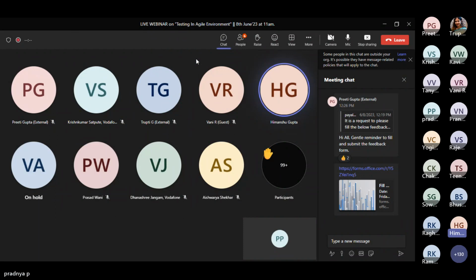Yeah, I think the only challenge which I foresee, with the experience that we have during pre-sales, is the hurry of getting the project or getting the business from the customer. Generally, during the pre-sales, most of the salespeople, and I do not blame any individual or any specific profile, but project managers can also be salespeople, tend to forget these nuances. If the scope is a variable factor and it has not been accounted for during the pre-sales, it leads to a lot of problems at a very late stage.